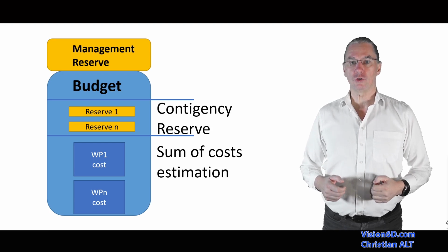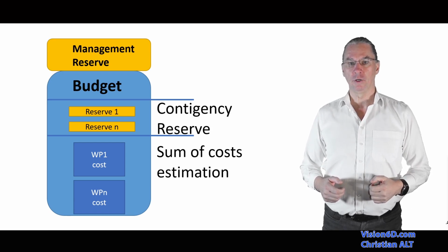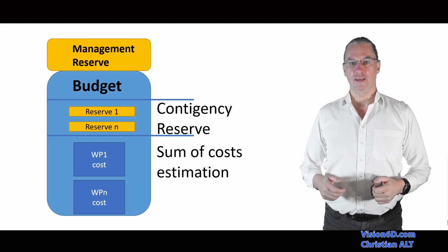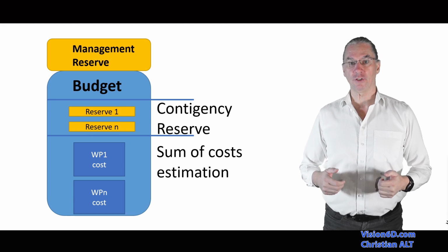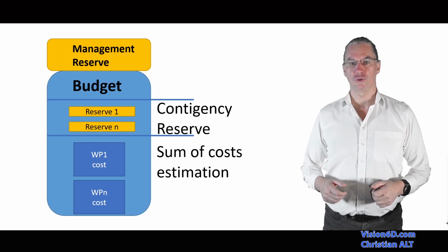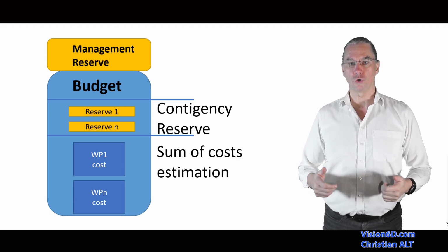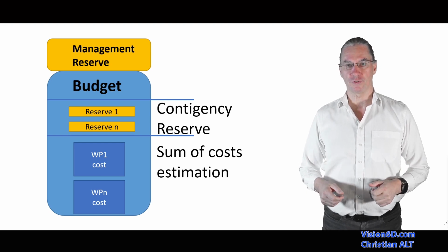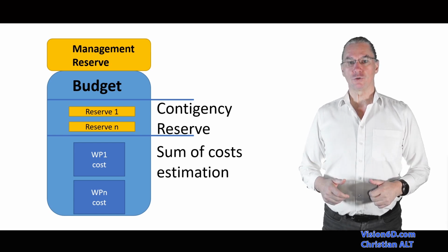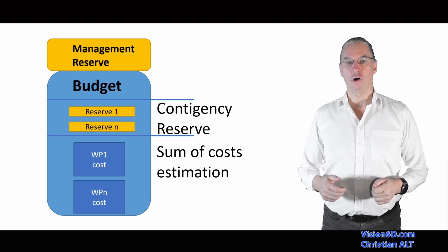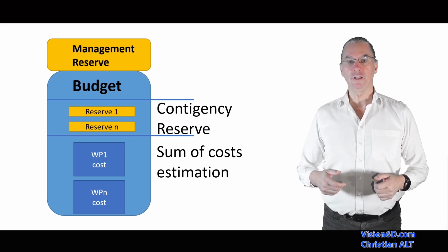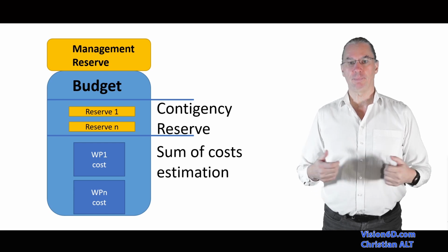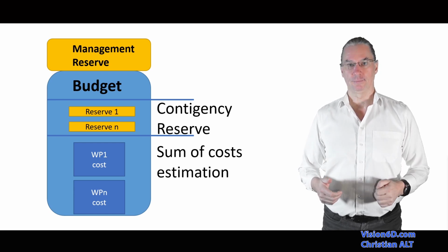On top of that, you see that I have added what is called a management reserve. This is inserted and is not under the control of the project manager, but by a board or the management board or the board of directors. For them, it's to be there in case there are, for example, really important changes in the project or really unexpected things that happen.